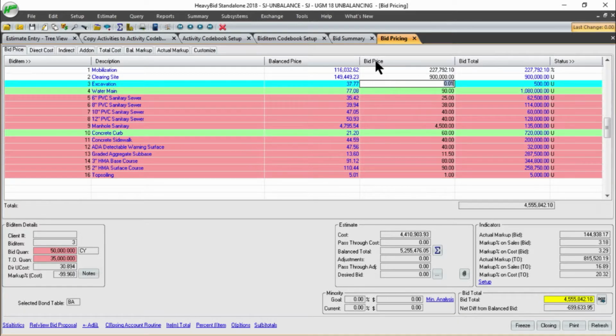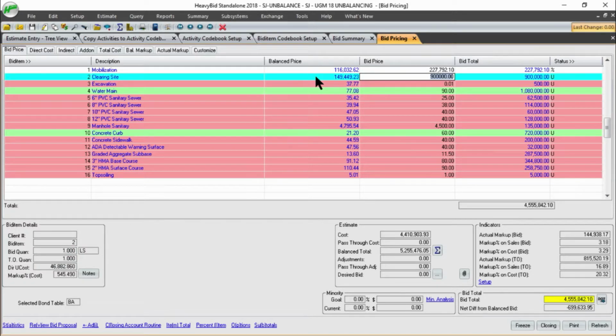That negative number actually went up another 8,000 because I had the bond projecting into all these items that were underrunning. So that gets a little complex, but it actually made you more competitive now by sending it to a lump sum item, since you were prorating the bond into all these items that were never going to happen.